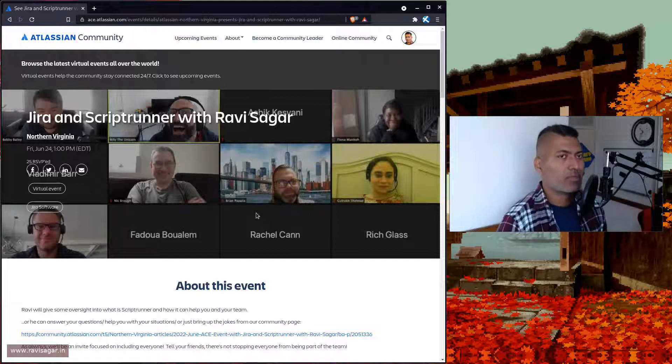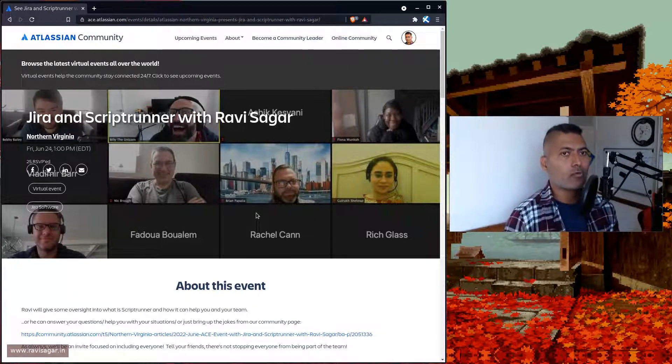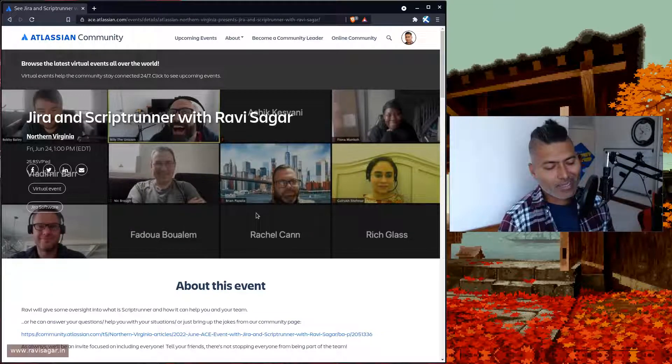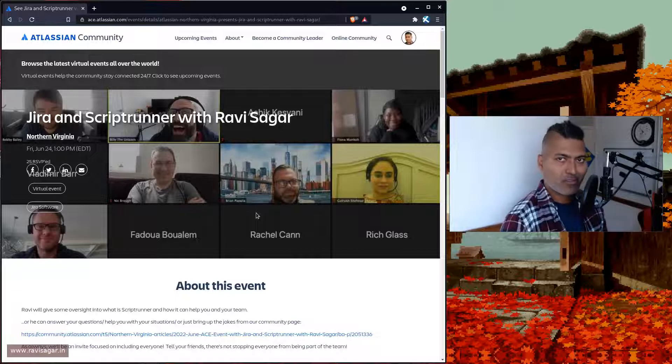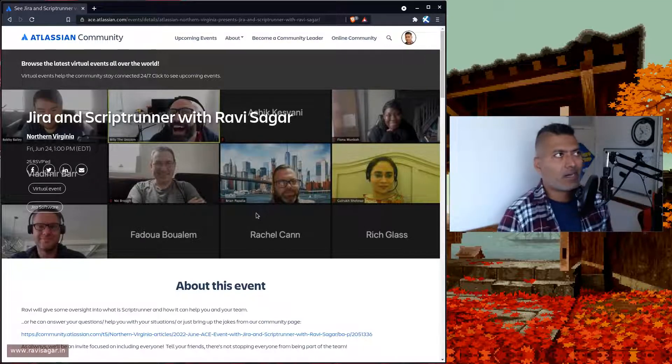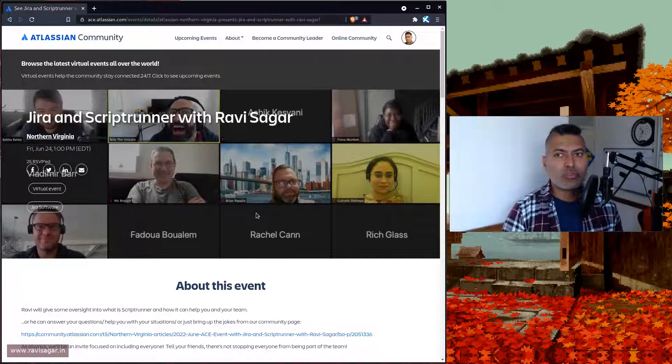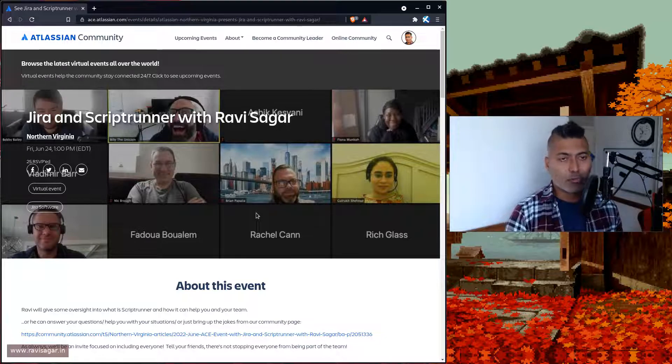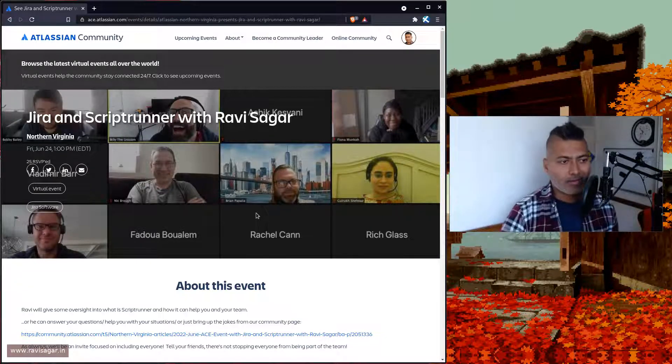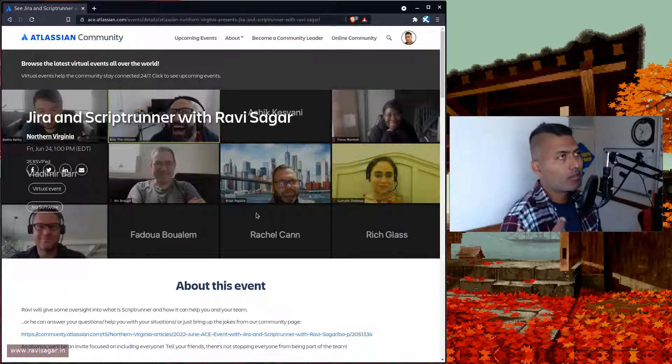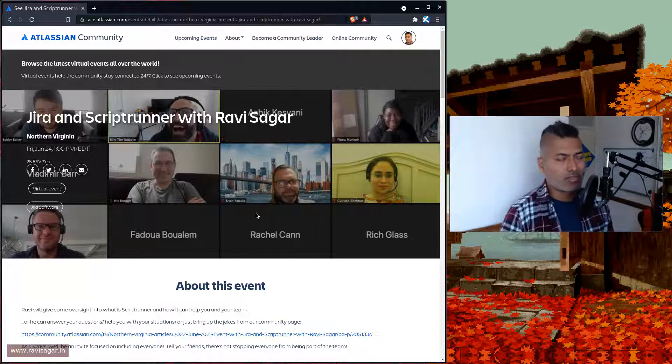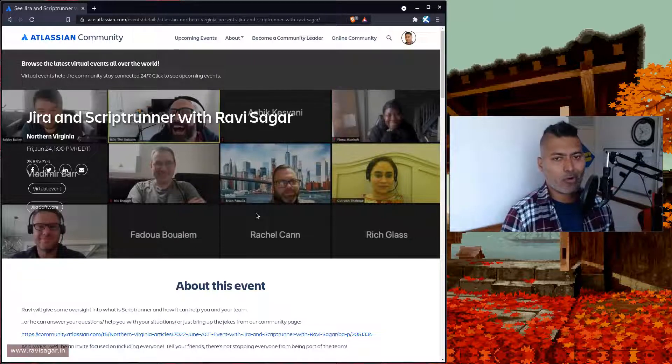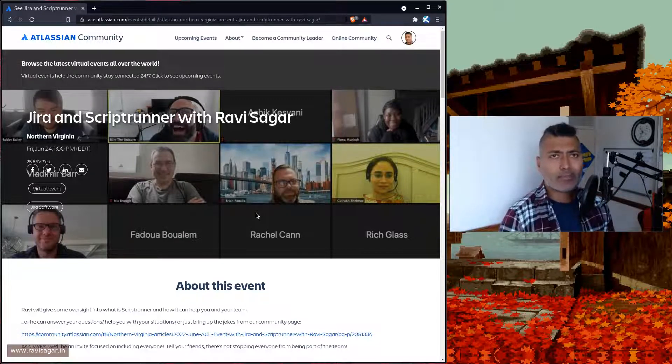The main advantage of using a script is you can do a lot of customizations. Those customizations could be looking at your issue comments and looking for specific keywords that can be picked up and presented to stakeholders. You can do calculations like presenting lead time or cycle time, whether you've met your SLA.